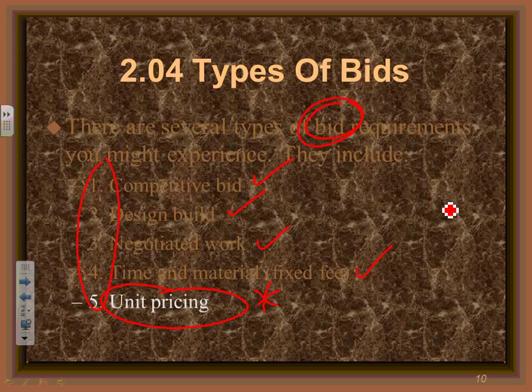Or a developer guys in Becker, and they want to develop 25 standalone dwelling units. Cool. And they want you as an electrical contractor to bid on the electrical part of it. Say, oh, no problem. I can do each and every one of these homes. Let's just say they're big homes, 4,000 square foot homes, right? I can do the 4,000 square foot home from A to Z, everything done, complete, given to the owner for $15,000. So you multiply these homes by 15, how many of them, and that will be your bid. Any comments, guys, about the unit price?